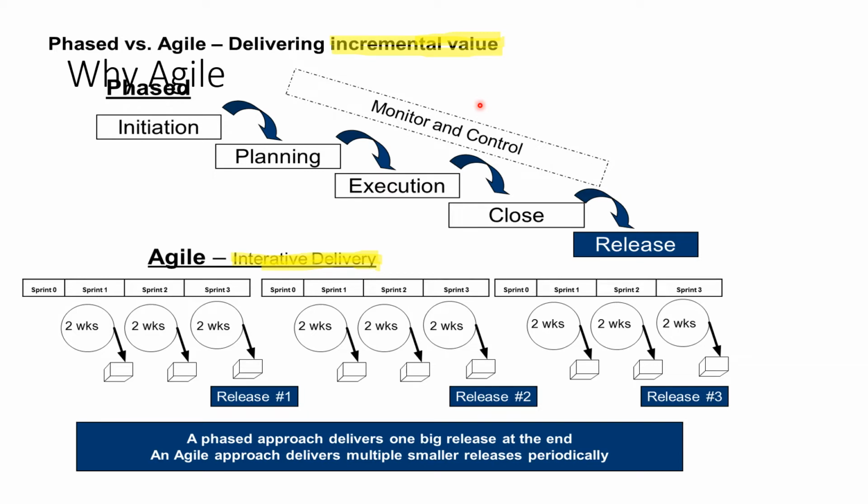You deliver incremental business value to the customer, sprint after sprint, iteration after iteration, and you do the delivery in a short span, right? You are not delivering big releases. We are delivering smaller releases, small packets. That's called iterative delivery. I'll give two scenarios. One scenario: every month you are delivering something to the customer. Let's say your sprint is one month in duration.